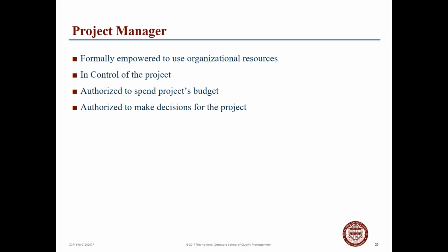They may be authorized to spend the project's budget, and on a lot of projects the bigger, more complex spend may need executive sponsor approval, but the day-to-day expenditure of resources is at the project manager level, and they're authorized to make some decisions for the project, again, maybe with executive sponsor oversight.